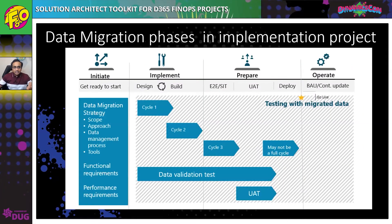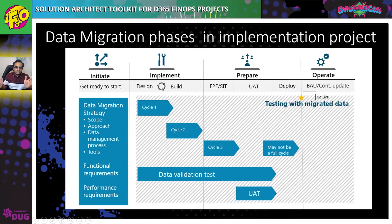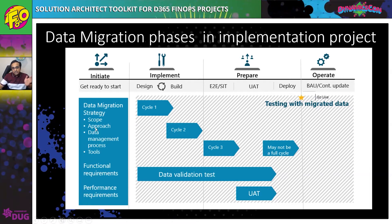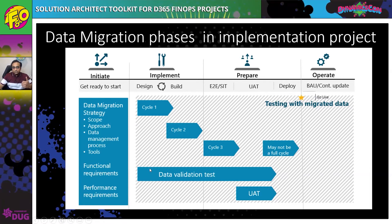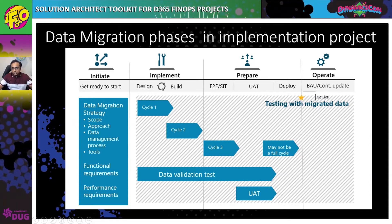An important point is that data migration is not a phase that happens towards the end of the project — it is an activity that happens throughout the entire project implementation. From project initiation to go-live, data migration is a continuous activity because you start planning, you start designing, you start doing some testing, and it is an iterative approach. It is very unlikely that you will successfully load all the data in one go — it requires iteration and refinement.